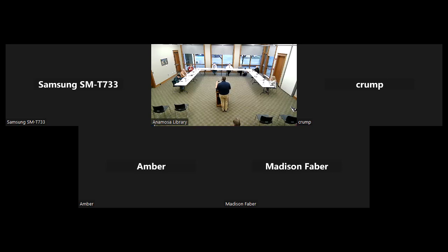Is there a drastic cost between the two? Right now ductile has been more expensive, but it's cheaper for them to do it from an installation standpoint. So if you were to break the 2 unit prices out, the ductile iron pipe is probably a higher percentage of that unit cost than the HDPE, but the installation method is going to be a higher portion of that when you go to trenchless.